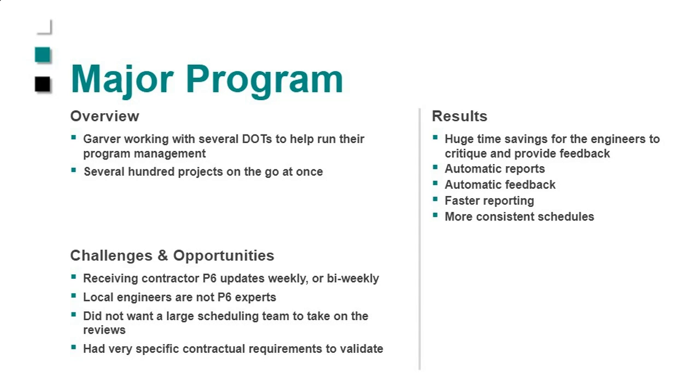They've got very strong project specifications requiring very precise updating methodologies. So they critique calendars, they critique the actual durations versus original durations. They have a lot of quality metrics, and they have the lead site engineers really doing the initial quality metricing because they liaise with the contractors on a day-to-day basis. They do have a project scheduling and project controls team as the backup, but they don't do the first pass on the update critique.